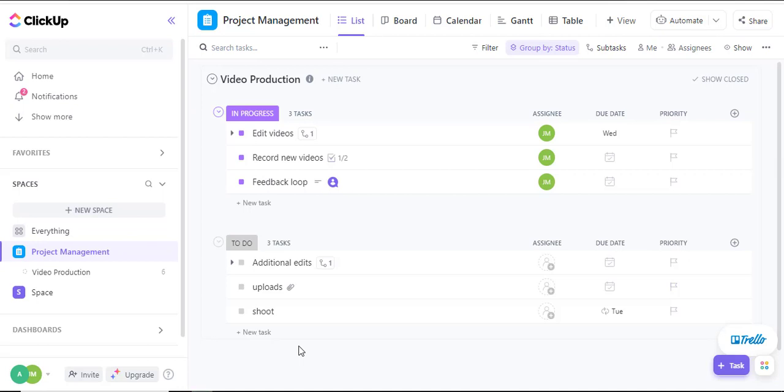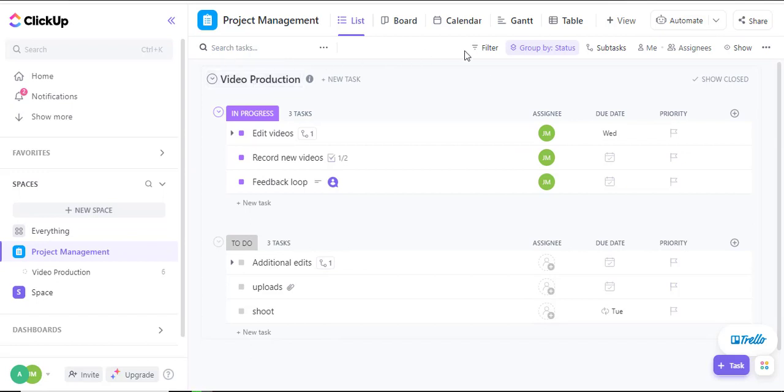So to view the tasks that are all in progress, the very simplest methodology to use is by using the group option. If you navigate at the top section once you open your task you realize there's a filter option and there is a group option.